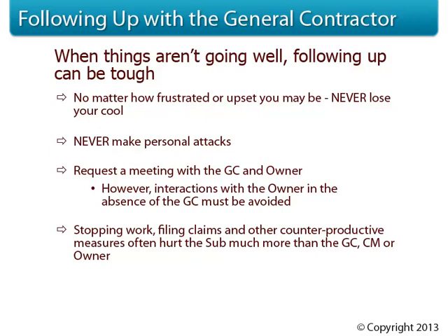When tensions and emotions flare up, subcontractors sometimes get so mad that they just say, "I'll get that darn general contractor. I'll just stop work. That'll show him." But the fact of the matter is that single sub stopping work usually does much more harm to the sub themselves than to the project or to the general contractor. Do everything you can within reason to keep the work progressing.